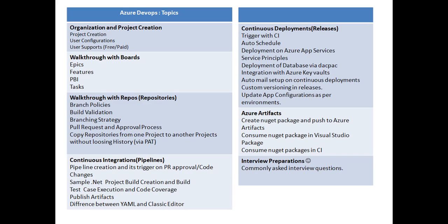For example, you have a sprint of 15 days and you have three members, and out of the three, one will work 5 hours, one will work 7 hours. All that stuff we can do there. After that, we will see how we can allocate the tasks as per our availability, right? So all that stuff we are going to check in our board section.